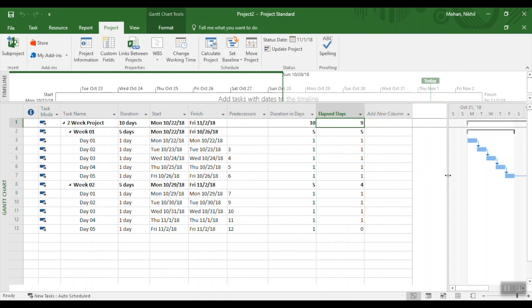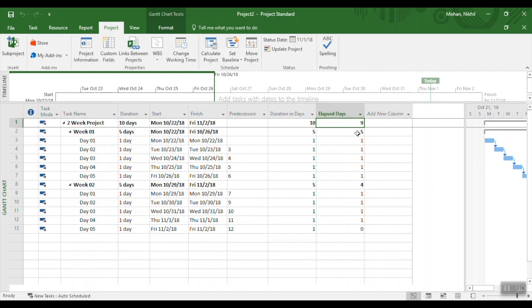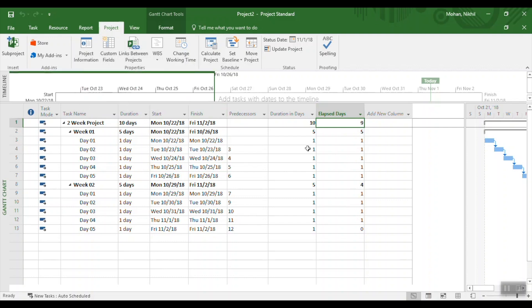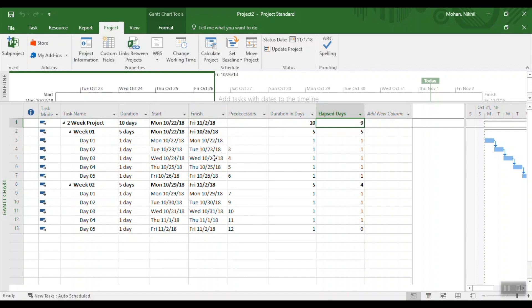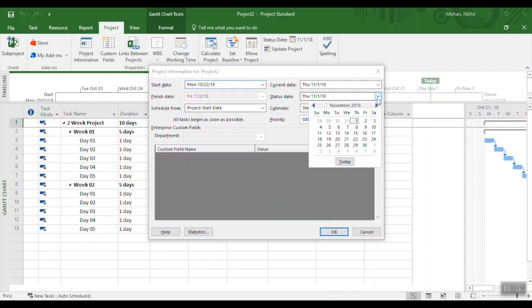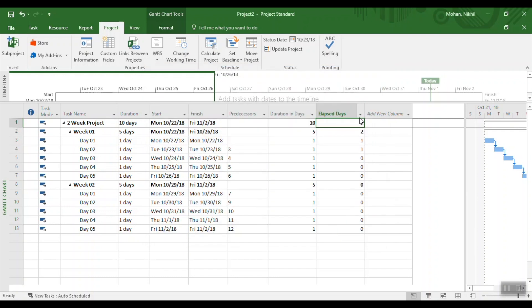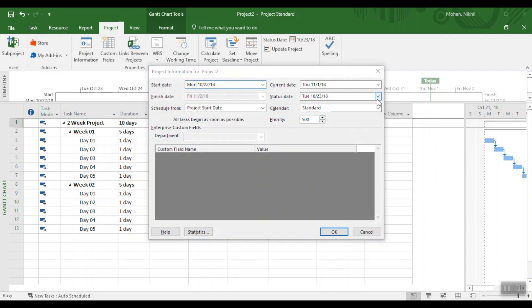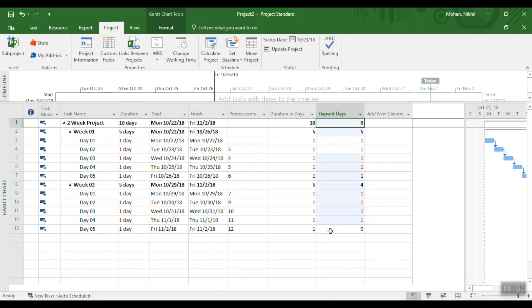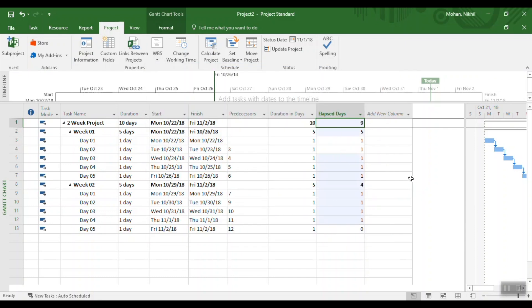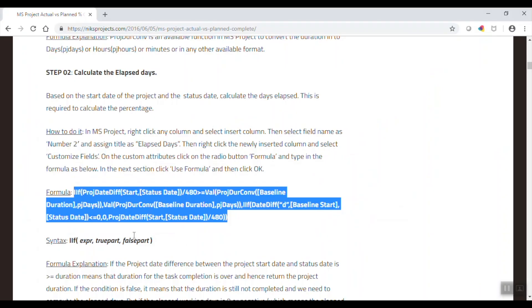At any point you can go back and recalculate elapsed days for a different date. For example, if you set the Status Date to October 23rd, the elapsed days should be only 2 — and you can see it goes back to 2 days. That's how the column calculates elapsed days based on the Status Date. Make sure you are setting the Status Date correctly to get accurate calculations.